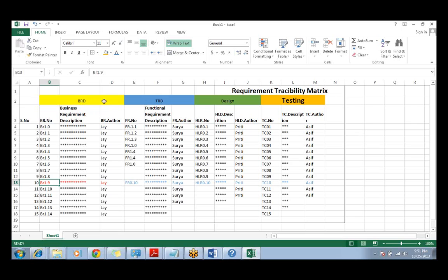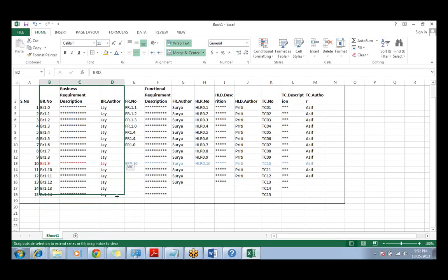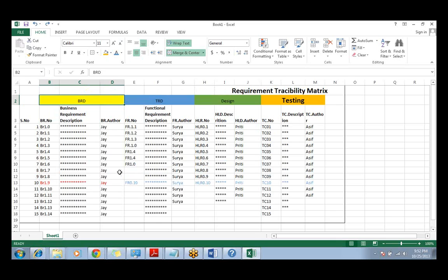I was explaining that every time you, Surya, I'll come back to you. When you are creating the business requirement document and the RTM, this part, what I have selected, this side of that RTM, at that point, you cannot keep changing this side of the requirement of the RTM, because if you do that, then there is a direct impact over here. So you don't update this document again and again unless there is a real update in your business requirement document. Okay?